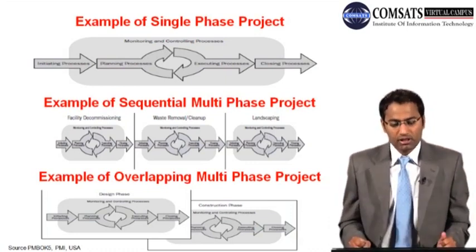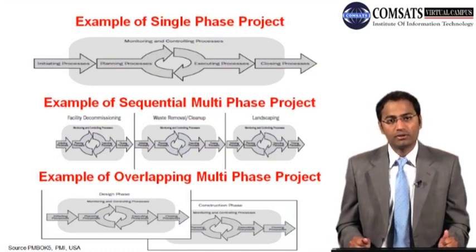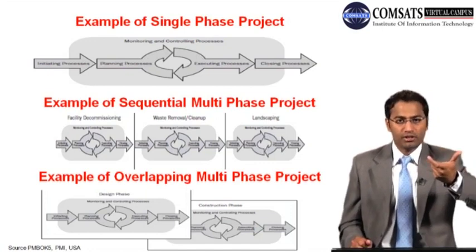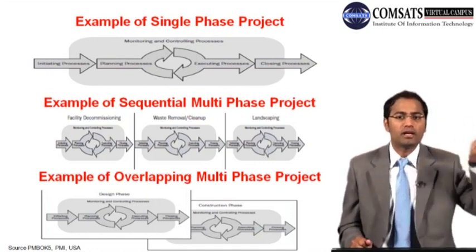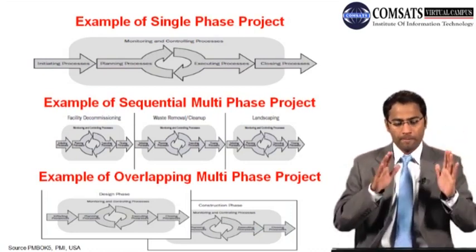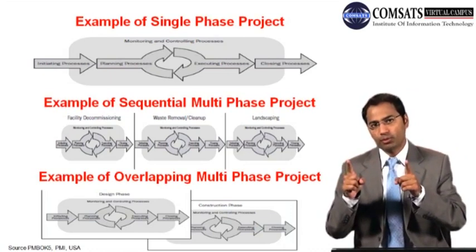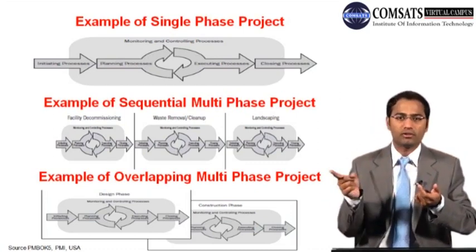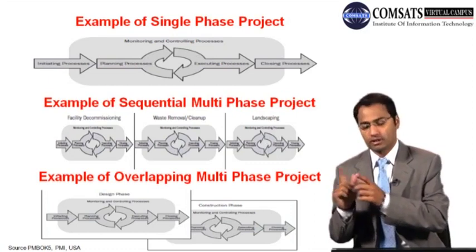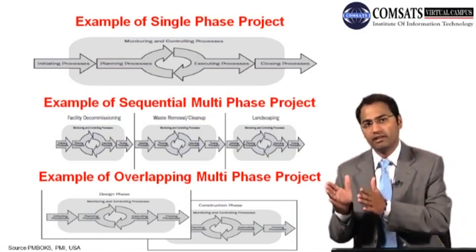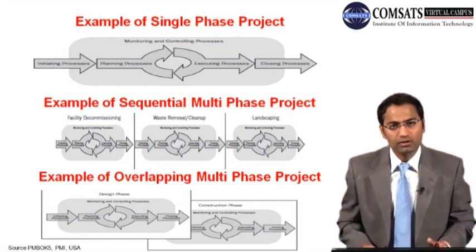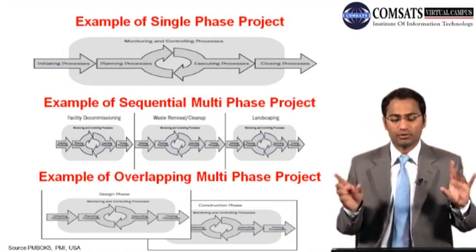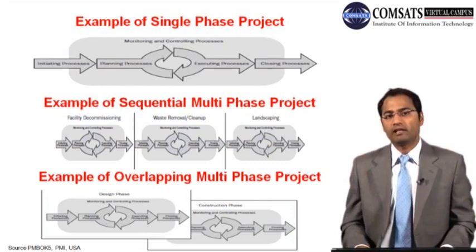But for a complex, sequential multi-phase project, what do you do? You take one phase, you initiate it, you plan and execute it, and you close it, and throughout the project you are doing monitoring and control. Then for the second phase, you again initiate, plan and execute, with monitoring and control throughout, and then you close it. Then there is a third phase, where you do the same as with the previous ones. While you complete the first phase, then phase two, and then phase three, you are completing your project. So this is an example of multi-phase.